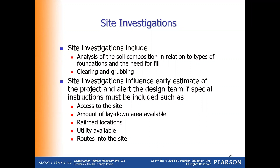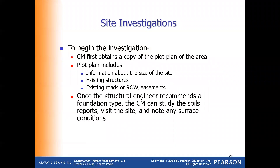In an urban area, we can tie in directly to the probably existing utilities, as opposed to rural where everything's going to be remote, and routes into the sites and so forth. The way we conduct the investigation is for the project manager or estimator to obtain a plotted plan to look at the size of the site, existing structures, and existing roads and right-of-way easements.